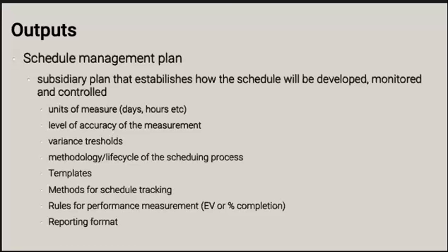Right. Can you build them into a Gantt chart, that type of thing as well? Yes. So part of this process is actually providing contingency reserves for each of the activities that have some risk associated with them, risks to the schedule. And one of the tools that we're going to be using is adding the contingency reserves to the activities. So that's going to be there.